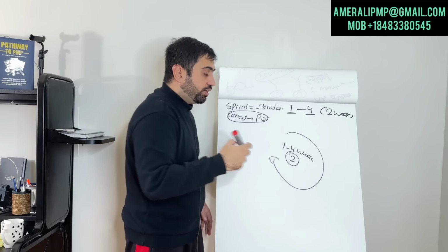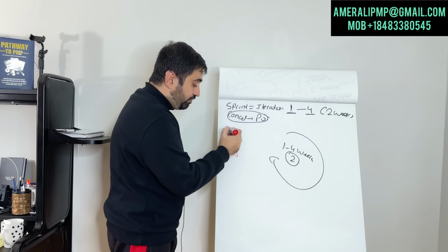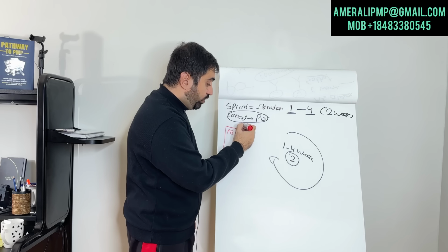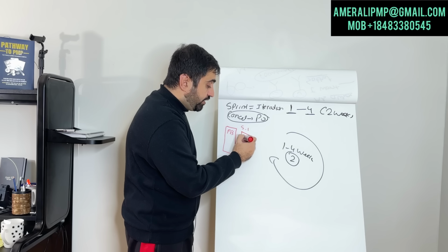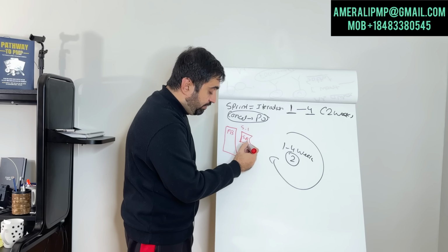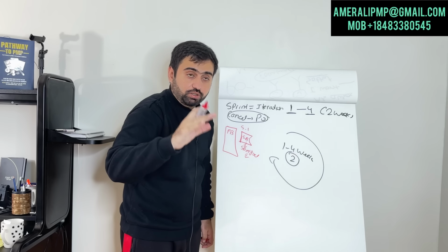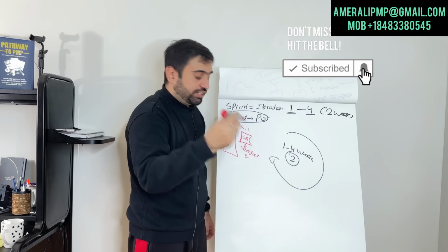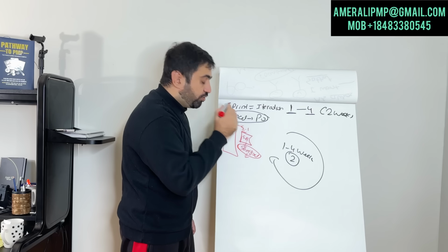So we already have a product backlog, right? We had a product backlog which has all the prioritized items. For every sprint, let's say it's sprint 1, we'll make a sprint backlog. From the sprint backlog we will establish the sprint goal, which is communicated to the customer. Hey customer, we are going to do this thing. Do you agree? And we work on that. Product owner has to agree on it and he has to get the customer to agree. The sprint backlog is actually a subset of the product backlog.